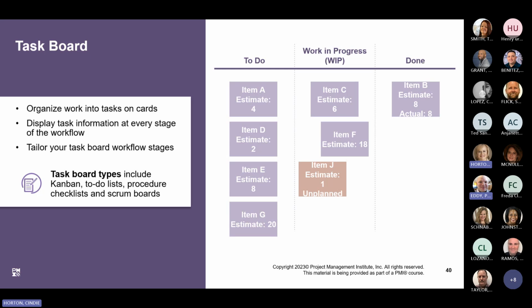Different color sticky notes can represent different types of work, and dots or numbering can be used to show how many days a task has been in its current position. Flow-based projects, such as those that use Kanban boards, can use these charts to limit the amount of work in progress. If a column is approaching the work in progress limit, project team members can swarm around the current work to help those working on tasks that are slowing the flow.